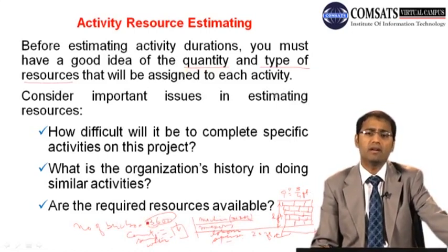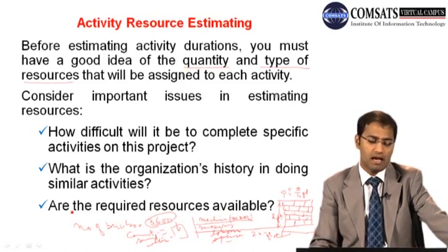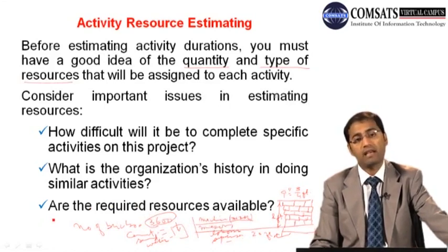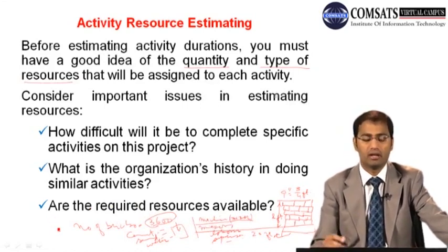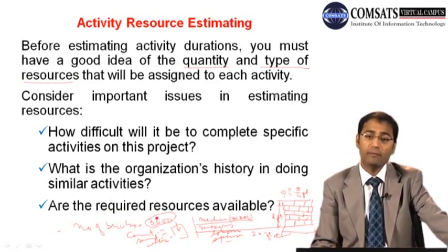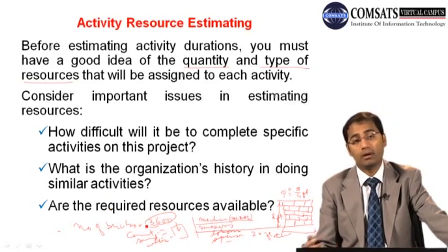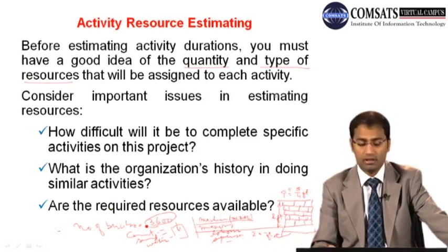We are available with one mason with our company, and we have these standards that one mason can actually plant about 1250 or 1200 average bricks in one day. So how many masons are we in need of?